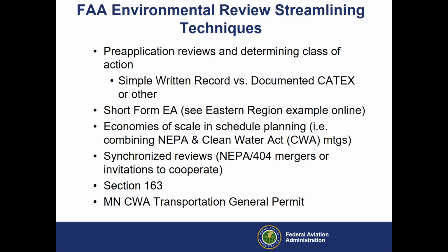The Corps would be looking to our NEPA document to adopt if they've got an individual permit or letter of permission out there. And so they're already moving through some of their own NEPA phase. And in that NEPA phase, let's say you're submitting a Clean Water Act permit application and it's complete. Well, come draft EIS time, we could combine those meetings for the Clean Water Act permit and the NEPA phase just to save some more time and money for everybody involved. So things to think about there. There's lots of opportunities out there along those lines.